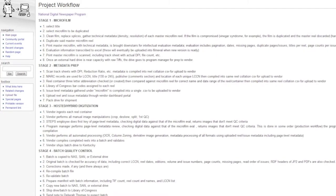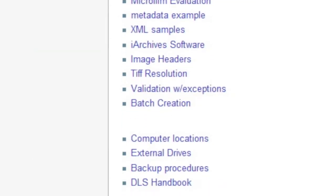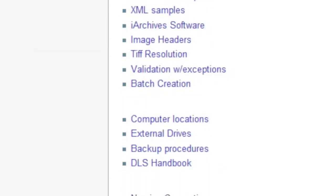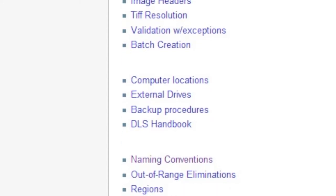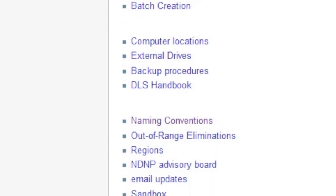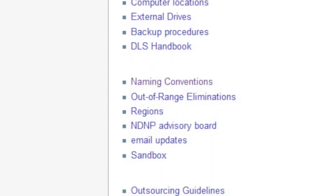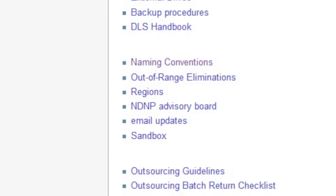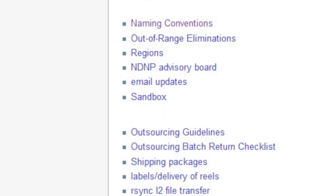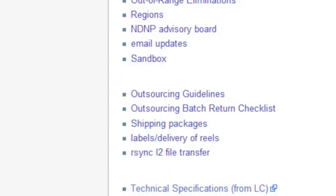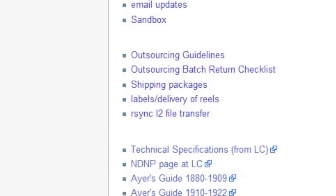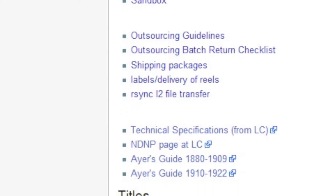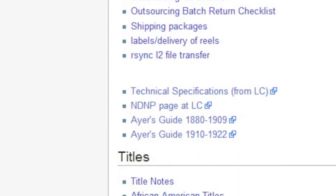You might report metadata exceptions, errors, and project changes on a project wiki through email correspondence in a vendor's project management software or during weekly conference calls with your vendor. At South Carolina, our project wiki allows us to document common mistakes and how to resolve these mistakes. It serves as a troubleshooter for future batches that may also have similar errors.